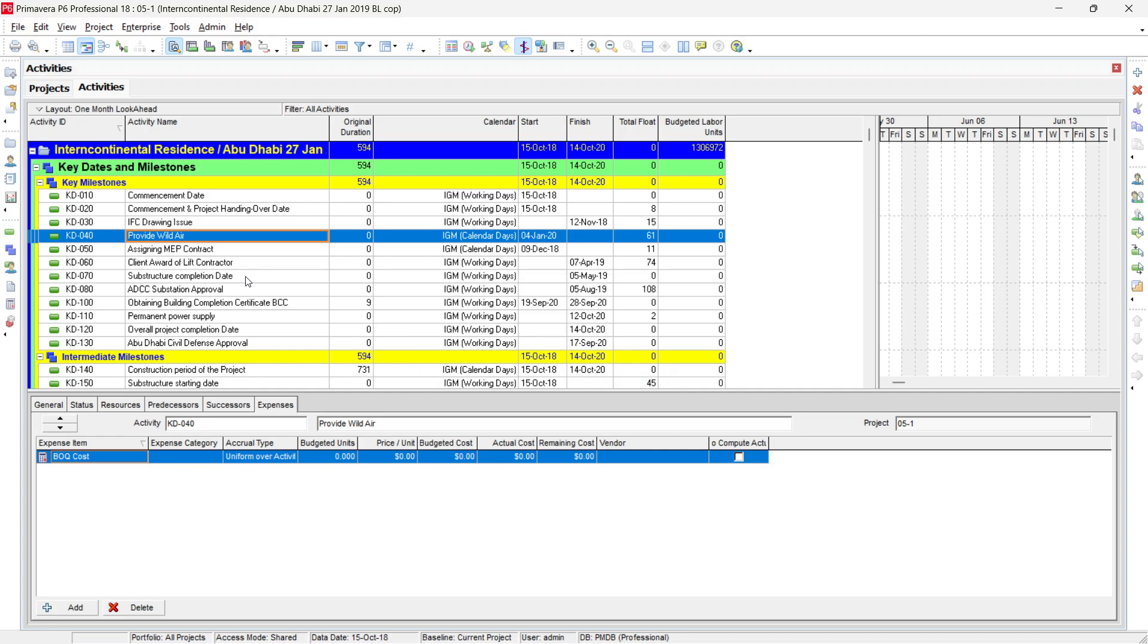The other way is that we select anywhere and just press F5 button. Pressing the F5 button will automatically update the impact of all the changes we make by using the fill down option command.